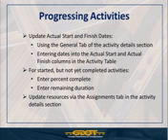Primavera does have the ability to handle that in two different ways. You can choose to link remaining duration and percent complete, so that if you say an activity is 50% complete, then you have half the duration left of that activity. What you will most likely do, and what most customers do, is choose not to link that, because we all know just because I used half my duration doesn't necessarily mean that I'm half done with the activity, right?